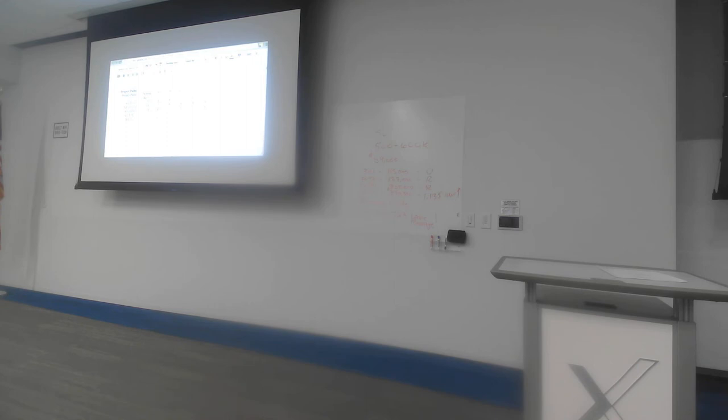Now, here we go. This is why we do this table down here. We can see that this was the original critical path. I've crashed lots of different activities, and I was keeping track of how the different path durations were moving based on the different activities I was crashing. This path down here at the bottom, the B, F, H, and J, that has suddenly now got a duration of 15 days, as well as the critical path. So if I go back to my project network diagram and I pick out that path B, F, H, and J, that also now has become critical. It has a duration of 15 days, just like this original critical path has as well. So what I have is a dual critical path. I've got two paths that have the same duration.